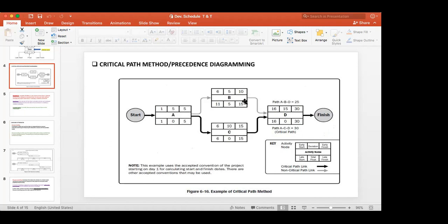You can adjust 5 days because of the resource leveling. Because of the resource, you have, but here in any activity in the critical path, if you are going to adjust, the critical path will change. But here, since there's a float, sometimes it is possible to play within that float of 5 days.